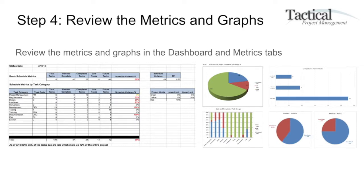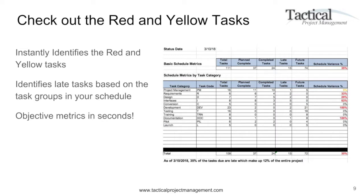As you can see in the screenshot, I've instantly identified all my late tasks, organized by task groups, with different dashboards indicating task progress and a summary of issues, project risks, and more. Looking at the red and yellow tasks, I've categorized all tasks across several task categories — for example, I'm 9% behind on project management tasks, 33% behind on requirements, and 100% late on development based on schedule variance.